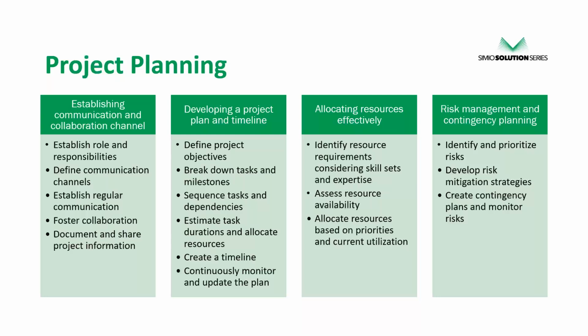The next piece is building out the plan, right? So you've talked to all the stakeholders, and you've gotten all of the different objectives that they have for this particular project. Now you start to break down those objectives into very specific tasks, not even putting them in a plan yet, but just saying, in order for me to achieve this objective, I'm going to have to do these 20 things. And understand maybe the sequence that's required for those tasks within that particular objective as well.